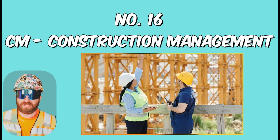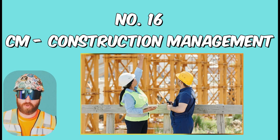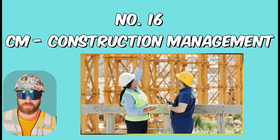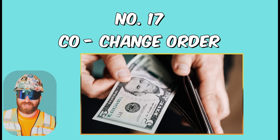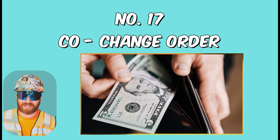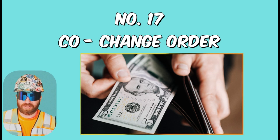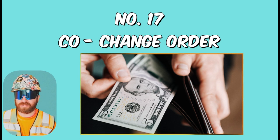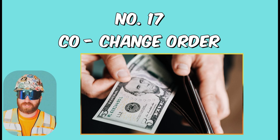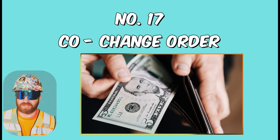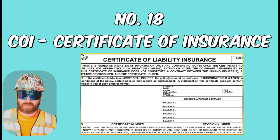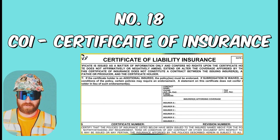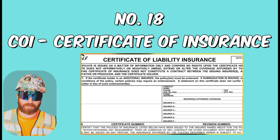CM, or Construction Manager. This can be a firm or general terminology for a variety of roles within the industry. Construction managers are responsible for planning, coordinating, budgeting, and supervising projects from start to finish. CO, or Change Order, is when the owner or architect changes aspects of the construction documents, therefore changing the aspects of the contract — this may result in a price increase or decrease, or a schedule increase or decrease. COI, or Certificate of Insurance, is just making sure everyone's covered if there was an unforeseen accident.